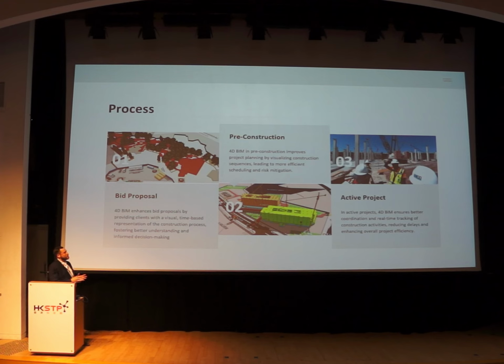And a little tip that I learned at Multiplex and now at Austin Commercial is that the same team who works on your bid proposal, take a few of those individuals and carry them through to pre-construction into the active project stage. When you do that, you don't lose information and you don't have to teach people that information. So the information flow is continued from the day you get your bid proposal all the way to substantial completion.